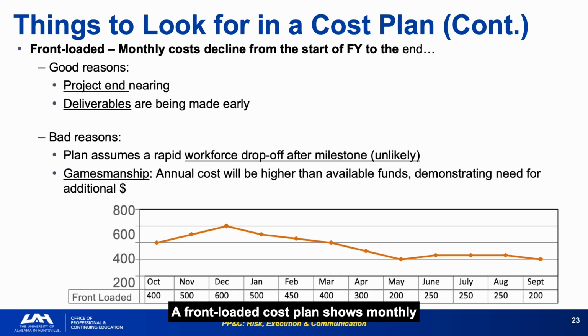A front-loaded cost plan shows monthly costs declining from the start of the fiscal year to the end, which can be legitimate if the project is nearing completion or making early deliveries, but is a red flag if it reflects an unrealistic assumption of workforce drop-off. The gamesmanship version of front-loading